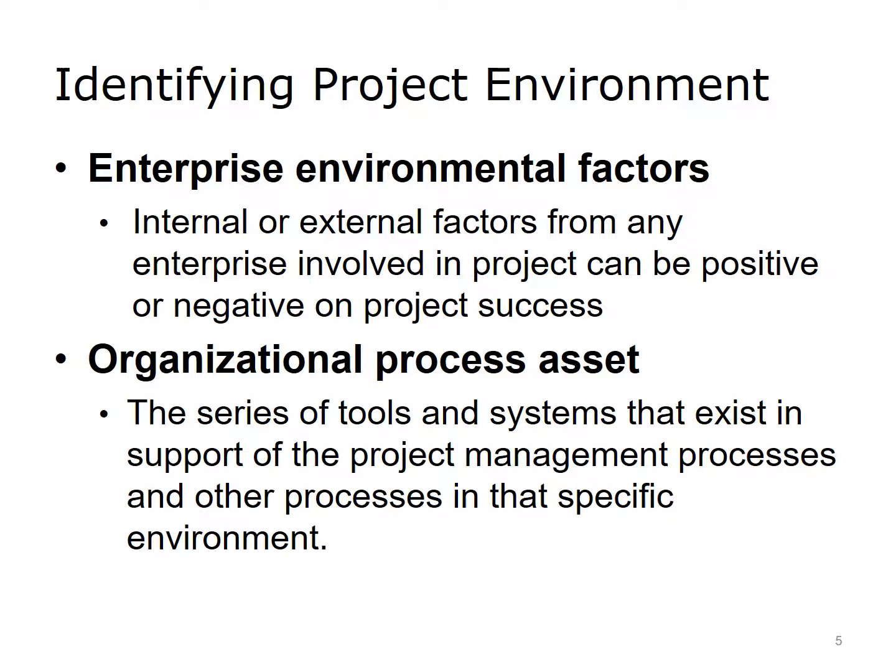During the project selection process, one of the top priorities is to develop a clear understanding of the project environment. When evaluating an enterprise and its environmental factors, the following key environmental factors should be considered: organizational culture and cultural perspective of all involved parties. Will the culture support the project and the steps required to successfully undertake the project? Existence or lack of a project management information system. Is there a system in place to support documenting all aspects of the project and to facilitate the key elements of monitoring and controlling the project?